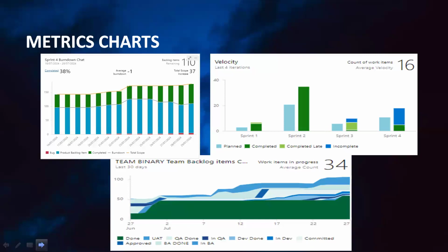For this one, this is our burn chart used to measure our work in progress, and it shows the amount of work done and remaining. The blue line shows our product backlog items, the green shows the completed work. We started with some PBIs, the BA added more. We completed some and had one bug, which we haven't been able to fix. Most of the PBIs committed during this sprint planning were the ones our BAs were treating before the development environments were merged. Most of the PBIs committed are the ones fixed by Team Agile. The ones we committed for ourselves, we were able to develop everything. That's what is showing on the board right now.